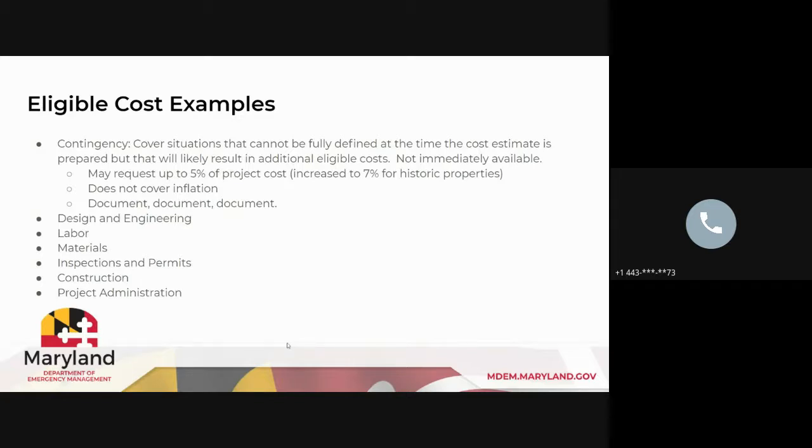And that helps us because what we've experienced this past year, we know that these are a lengthy, involved process. So we've had people, let's just say, put together their initial applications in 2019 for 2020 funding. So in 2019, they got quotes, they got bids, and then the projects are awarded 8 months later in 2020. And by the time they start getting everything to go and start construction and break ground, the construction costs had skyrocketed. Now, in most circumstances, there is really not a pathway for us to be able to request additional federal funds to cover these types of cost increases.